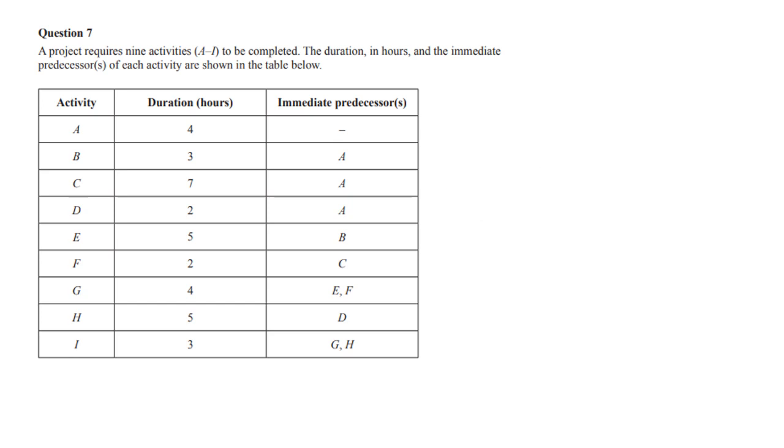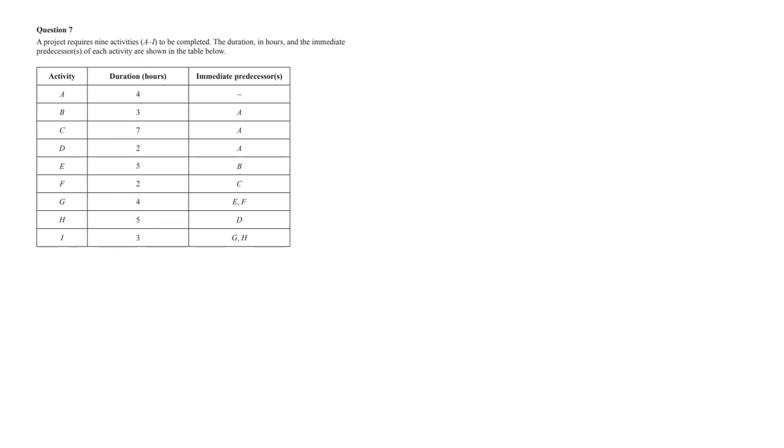So bye-bye to that. But what we'll try and do is use that table to draw the graph at least. Now I've had to shrink this down a bit, so I've got plenty of room to draw the graph. We'll start with the start as always. And this time we're also going to add these things. They call them durations, that's kind of weight. So we'll put those on the graph. Now we've only got one activity that has no predecessors, that's A. So we can just do a straight line like this. Put our arrow on, and we're going to say A, comma 4. The 4 is for that duration. So we're adding the weights. It was worth the wait.